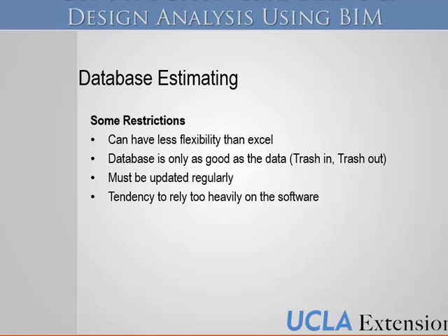Well, because in reality, we put prices for the first activities. We give more money to get money through the project, and then the last activities we give less pricing.